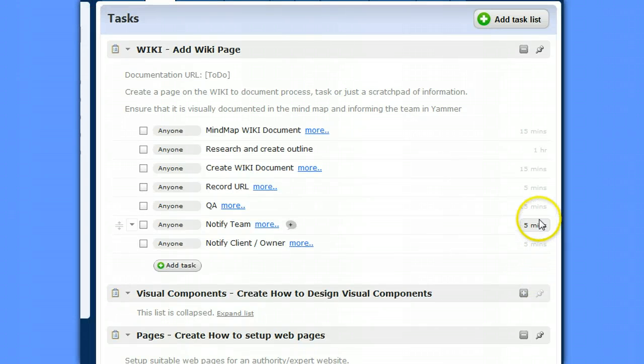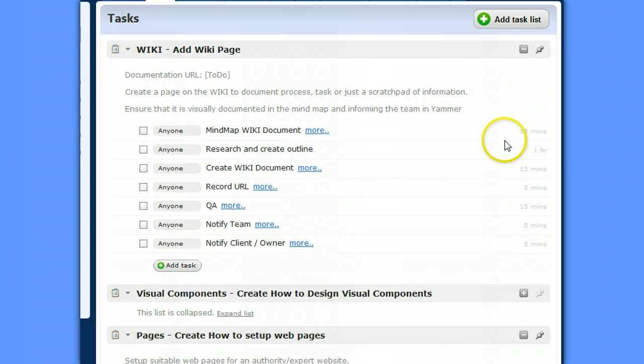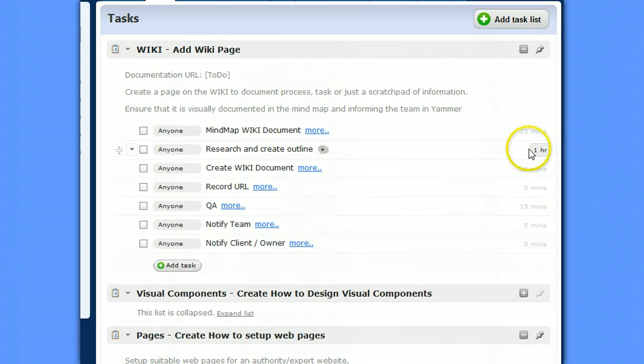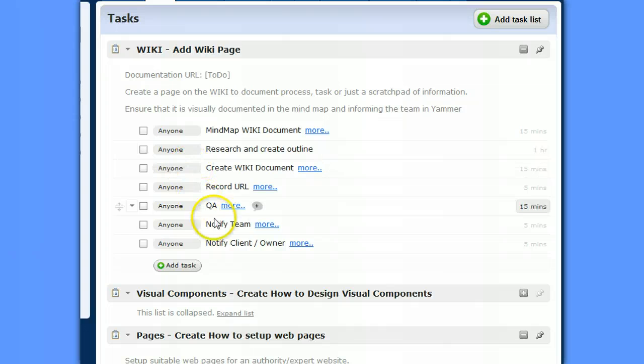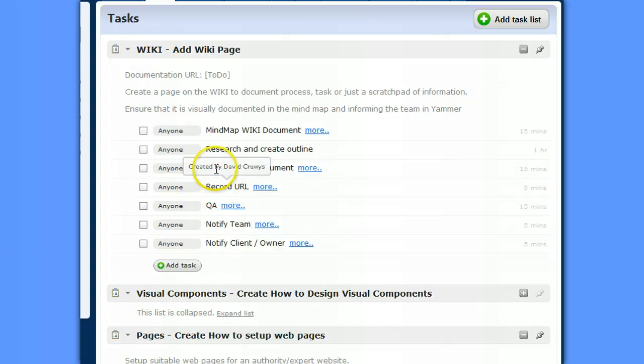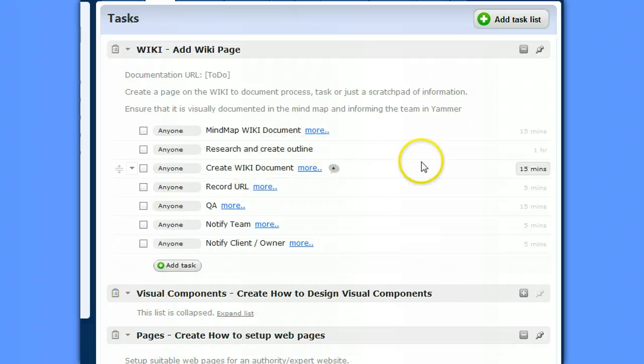And the next thing you can go through is just give estimates for each of those tasks. So for each of them I've just added a bit of a time. The only one that's actually going to be different based on the wiki document is probably the research. Sometimes it might be three, four hours, a couple of days, but that'll be up to the project manager to decide. But the next step we need to do is create dependencies in that we can't record the URL until we've created the document. We can't create the document until we've done the research, etc.